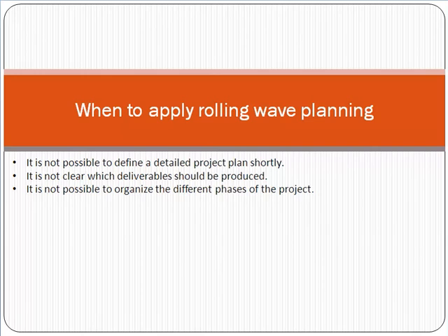So at that particular time, when things are not 100% clear, you can just put some rough estimates there, and at some later stage, when things get clearer, when you have the knowledge, and you know how things will proceed, and you have the detail requirements, details of issues, risks, scoping, etc., you do the detailed planning.